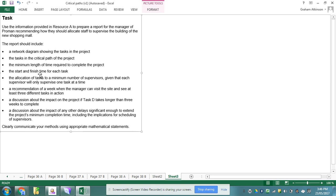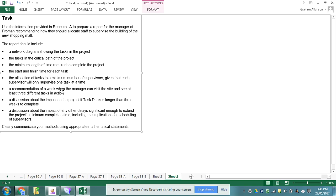I need the start and finish time of each task. That's all my critical path diagram, allocation of tasks, the number of supervisors given that a supervisor can only supervise one task at a time. That's my Gantt chart. A recommendation for when the manager should visit the site. That again comes from my Gantt chart.